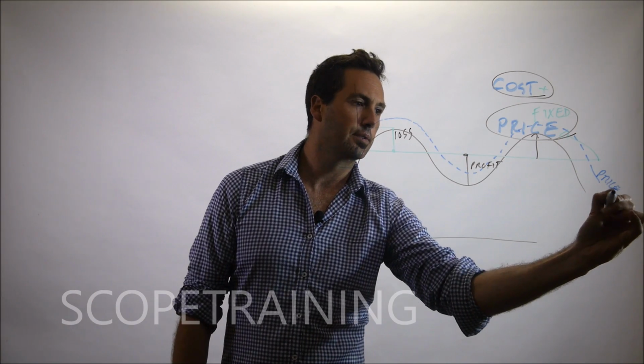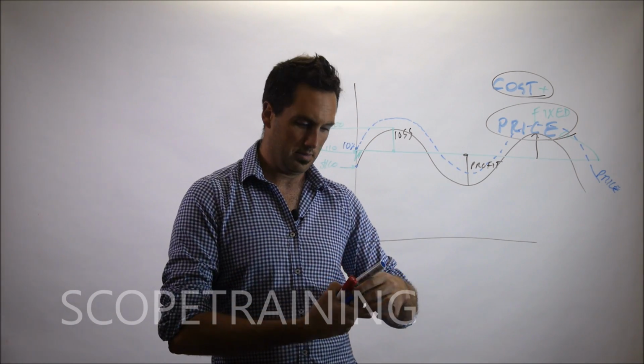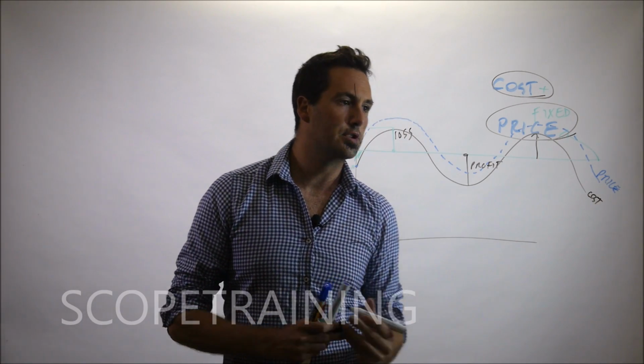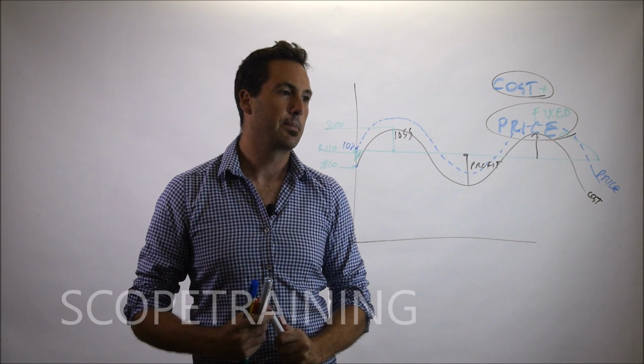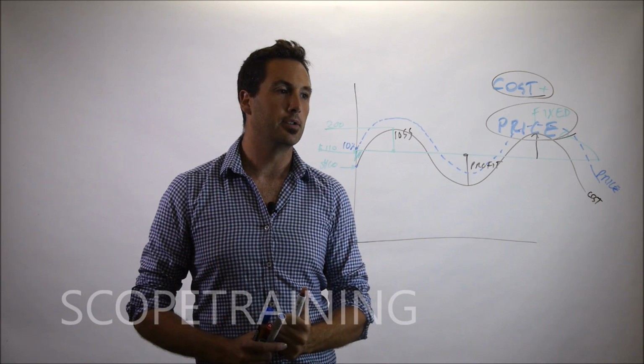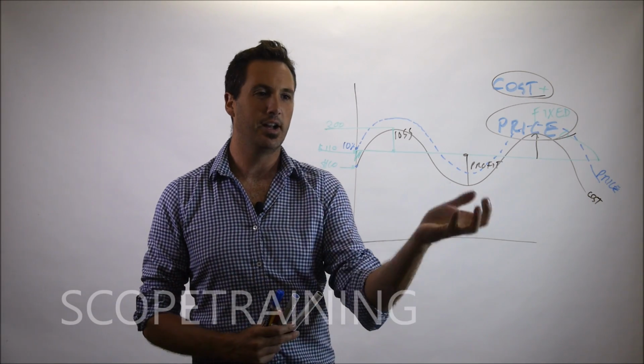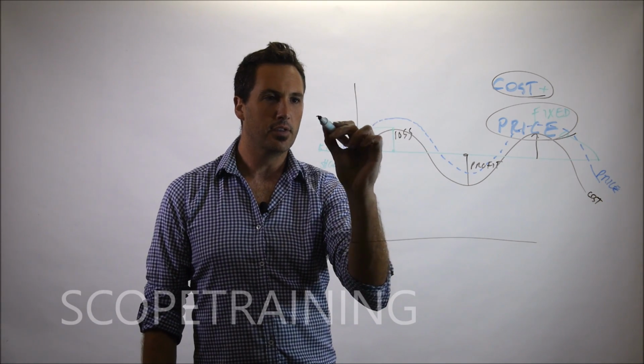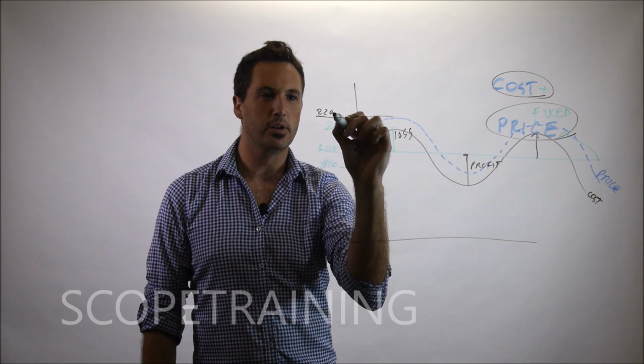So the price is more than the cost. And this is good because it reduces the risk to us as a business. However, from a client perspective, they may not agree because it makes it hard for them to budget. Because one day you're charging them $110, the next day you're charging them $220 and so on.